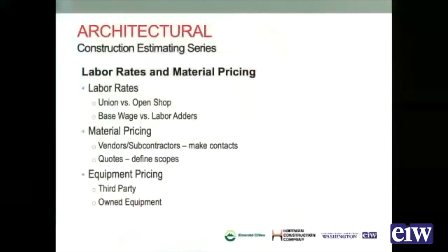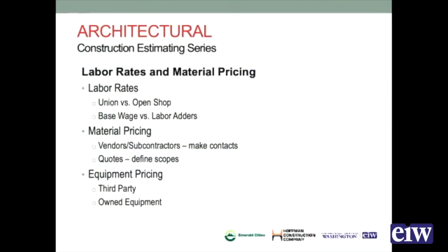I own the equipment, and I can choose how much I charge for it, depending on the project and what the environment's like. Because if it's a recession type environment like we saw 2010 and 2012, well, you might just say, I own the equipment and I don't need to charge for it, and that means my bid can be lower. That's a valid bidding strategy.